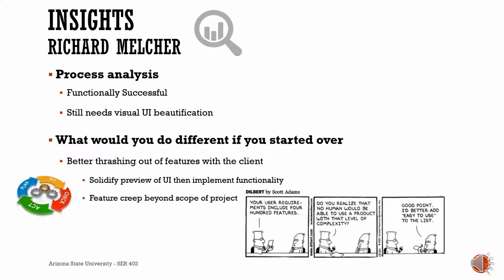Fortunately, this semester we became very successful and consistent with our task implementation, as you can see in our GitHub commit frequency. In hindsight, I believe developing a detailed project proposal without basic knowledge of developing in Android was somewhat a waste of time. We overestimated the ease of implementing some features and underestimated the difficulty of others. This played havoc with our project milestones and contributed to changing goals, project requirements, and feature creep. Better feature research would have led to a more consistent project proposal.